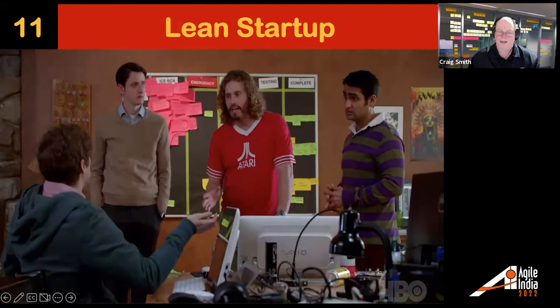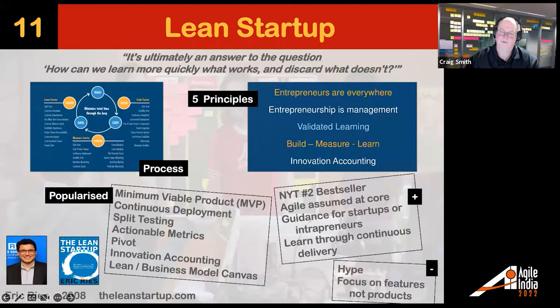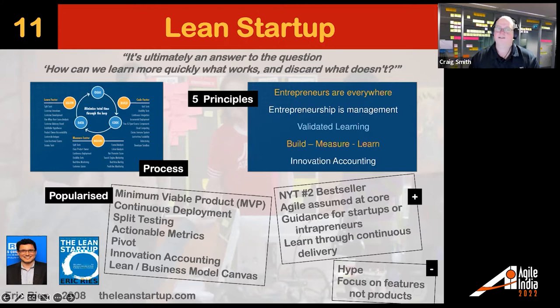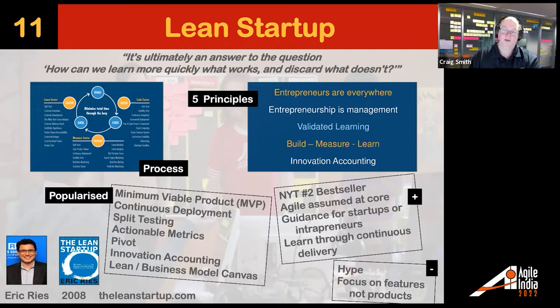Lean Startup went through a revolution, particularly in the late 2000s. When Eric Ries published it in 2008, it was a New York Times number two bestseller — no book in Agile or project management had ever done that before. It laid out how to be an entrepreneur, and even for organizations, entrepreneurship is super important. It was based on a very clear loop of build, measure, and learn — and do it quickly. The book assumed Agile at the core, saying of course you're going to be doing all basic Agile practices.